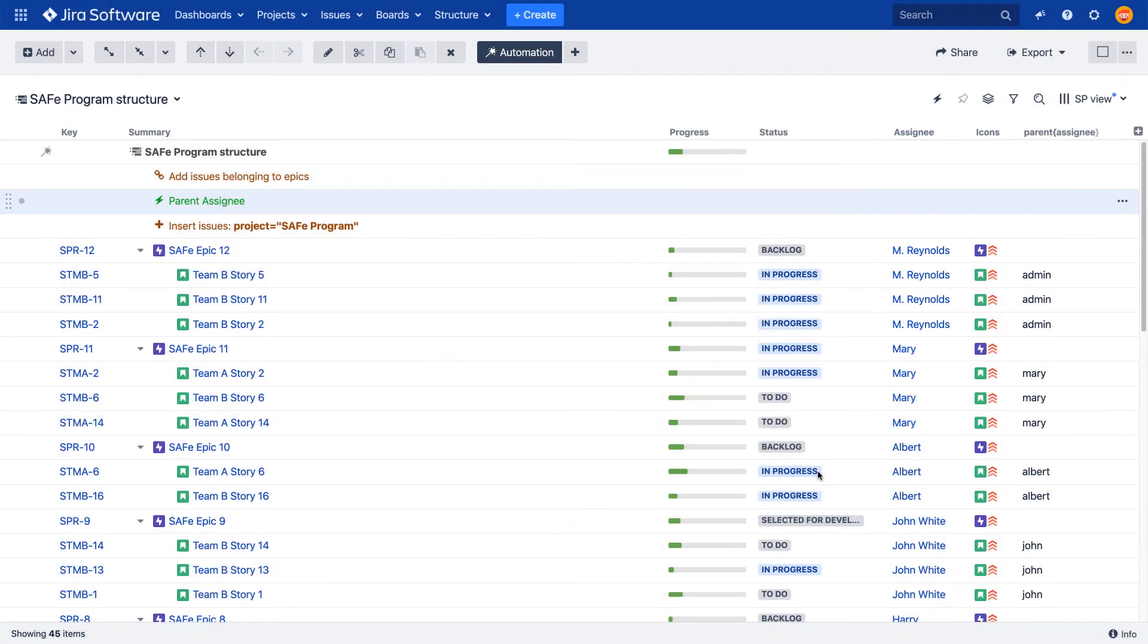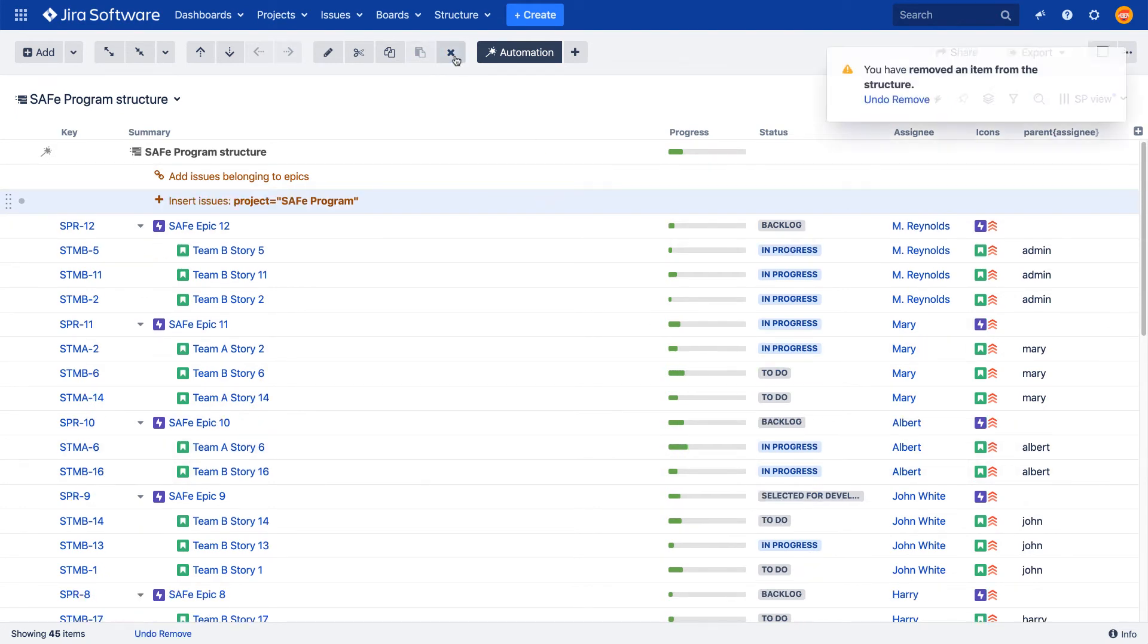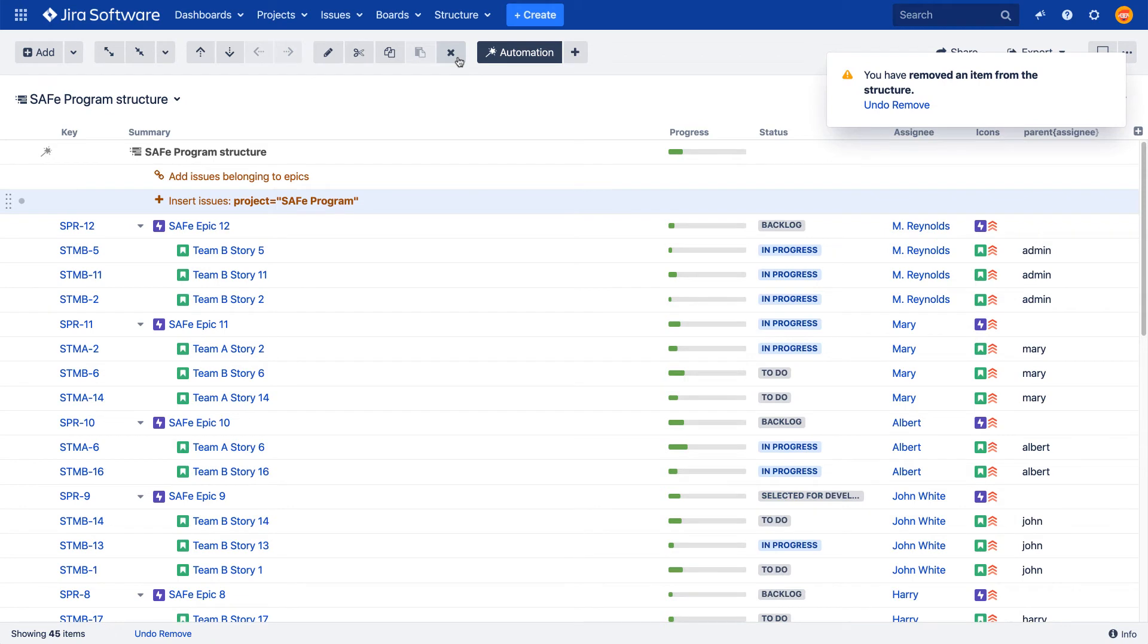If you don't need to use the effector again after it's done, you can remove it from the structure. This will not revert the changes you've already written to Jira.